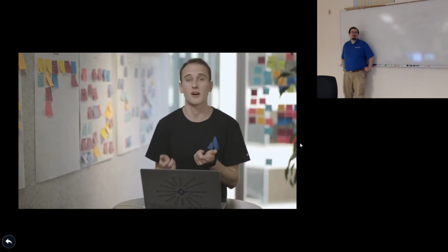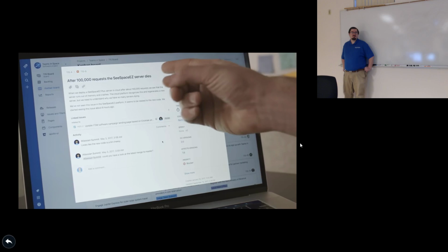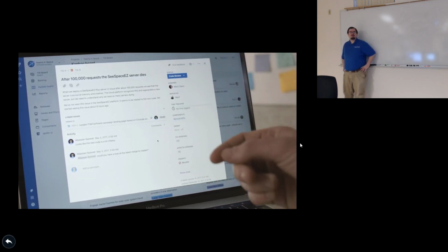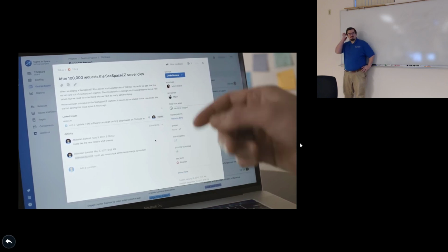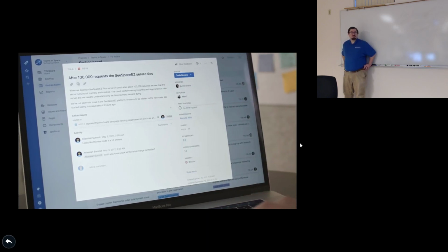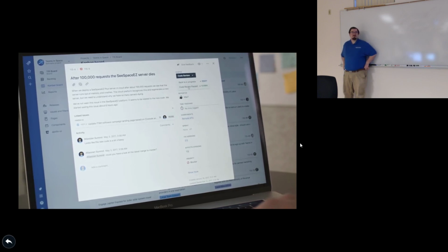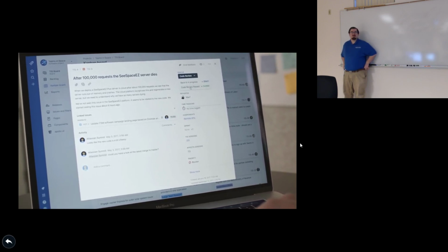Here are some components of a Kanban card for maybe a software development team. You'll want things like a title, a brief description, you'll want an owner, maybe some useful information like a label, a due date, an SLA, or maybe how much time has been logged on the issue. And lastly, at a glance, you want to know what stage in the workflow this card is in.